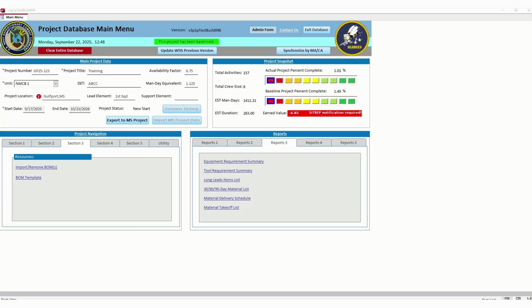So if you're missing a red man because he's still red, come all the way back to the beginning. If you can't find it when you're scrolling back, then just go back to the beginning of builder 1, click somewhere, hit next over allocation, and it will find where that's at for you. All right, so that's some best practices for that.